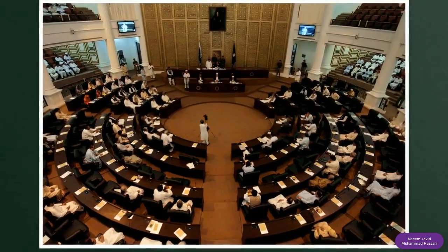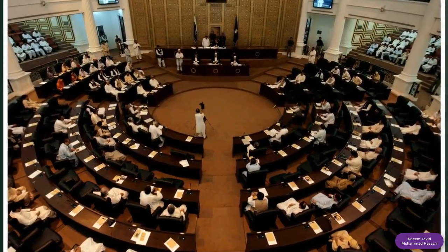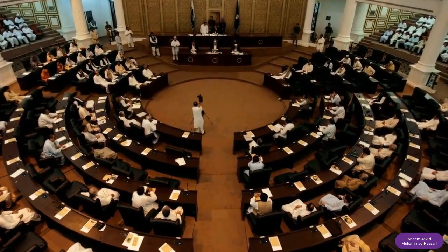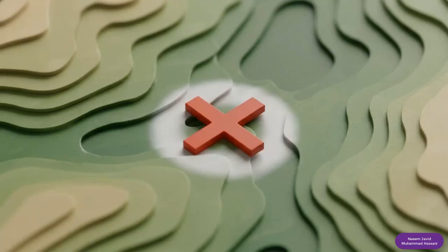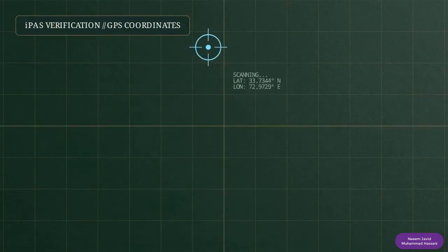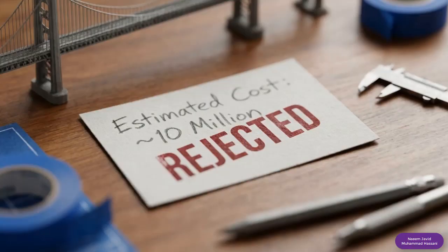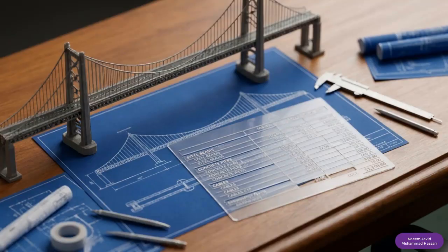Part A is the Project Digest. Here you must align the project's objectives with the 5-year plan and targets set by national planning forums. When defining the project location, general descriptions are no longer sufficient. You must provide precise GIS-based maps and exact GPS coordinates for the site. Regarding project cost, the Planning Commission does not accept rough estimates. You are required to submit detailed engineering designs and a full bill of quantities.